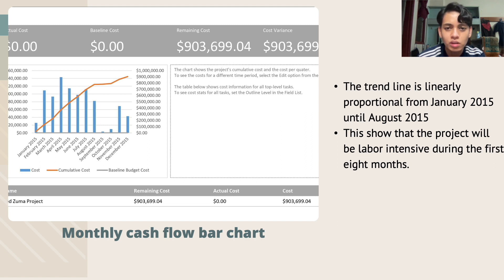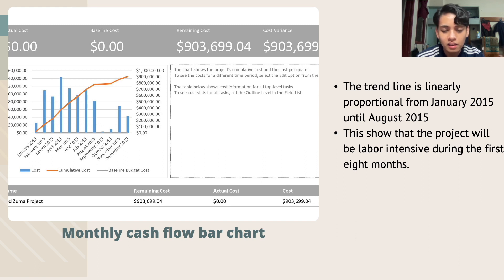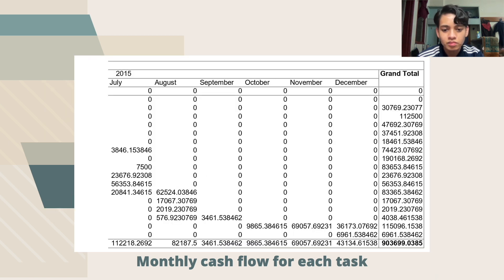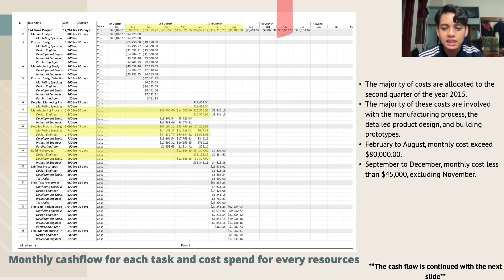From the bar chart, we can interpret that the trend line is linearly proportional from January 2015 until August 2015, showing that the project will be labor-intensive during the first eight months. Next is the monthly cash flow for each task.